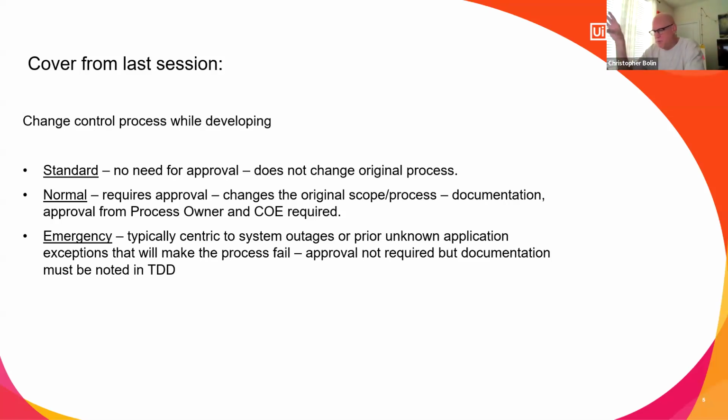Standard changes need no approval because they don't change your business process. Hey, I want a log message included here. Hey, I want a message box included here. Something small that doesn't change that process. Standard change, it's documented by the developer in the TDD, technical design document. Other people call it an SDD. I always refer to it as a TDD. It's a deliverable at the end of your project.